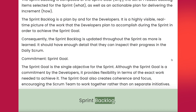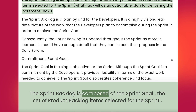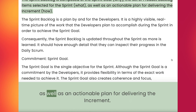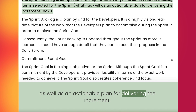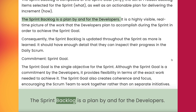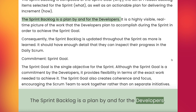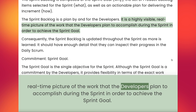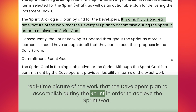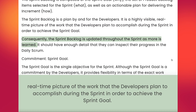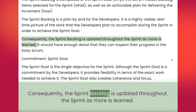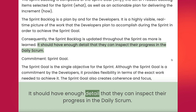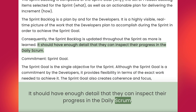Sprint Backlog. The sprint backlog is composed of the sprint goal, the set of product backlog items selected for the sprint, as well as an actionable plan for delivering the increment. The sprint backlog is a plan by and for the developers. It is a highly visible, real-time picture of the work that the developers plan to accomplish during the sprint in order to achieve the sprint goal. Consequently, the sprint backlog is updated throughout the sprint as more is learned. It should have enough detail that they can inspect their progress in the daily scrum.